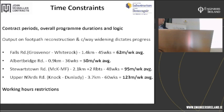And the other thing that it does in terms of your systems of work, if I can give a very simple example of curbing: if you're curbing a section at the edge of the carriageway and you're restricted half nine to half four, whatever you open up, you have to curb and reinstate and leave safe for traffic to run past it again the next morning. If you have a continuous lane closure, you can focus on excavation and preparation of curb base and come in and do a long section. So I've harped on long enough about it, but you can see from our site how the increased outputs can be achieved if there are no daily restrictions on the working period.